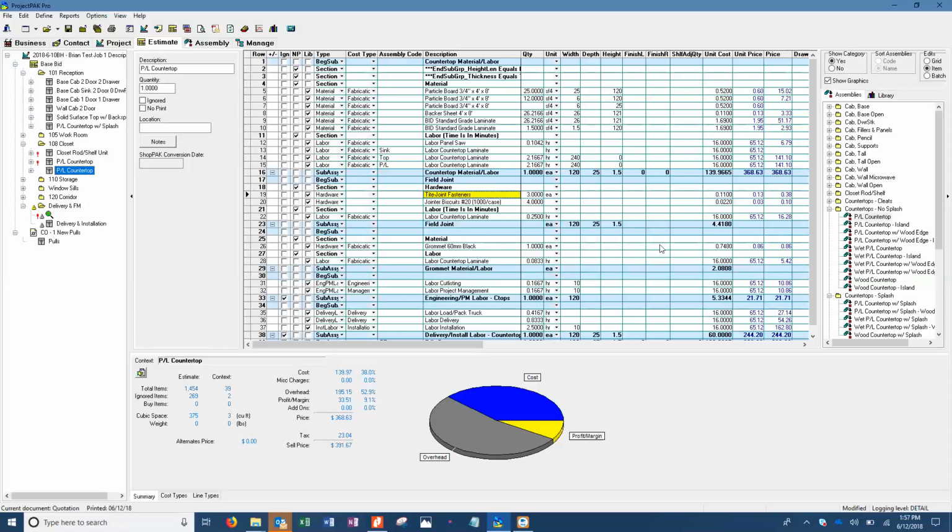So again, as we start to get deeper into this, we'll notice things like that. Like, oh, wow, you guys charge 300, we charge 368. What is the difference and what can we fix? And again, maybe it's just that in the past you did it this way. Maybe we try to quote it this way for a little while. We even then run it through the shop and see that one-to-one relation. You guys thought it took you this long. Now we do it in reality with ShopPack, and it really takes you that long. And so now we start to see, we were overbidding in this and we were underbidding in this. For me, it was edge banding. I always thought I was always over on my edge banding.